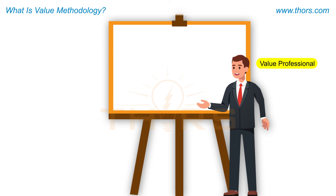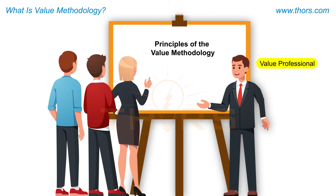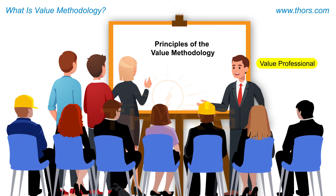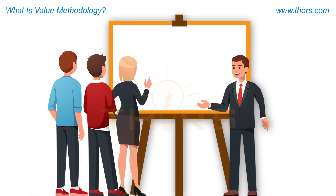A Value Professional facilitates a Value Study according to the principles of the Value Methodology. The Value Study Team is a multi-functional team, composed of experts from various departments within an organization. The Value Professional helps the Value Study team to analyze a project in terms of its functions. Functions are succinct two-word descriptions of the tasks a project does, using a combination of an active verb and a measurable noun.